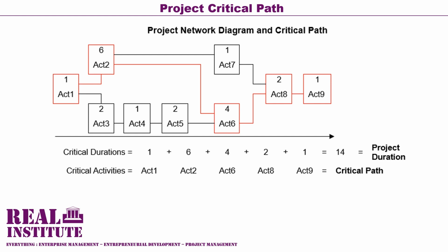The determination of the individual project activities' durations is not adequate to use in determining the total project duration. Due to the complexity brought about to the project work by the sequencing and dependencies among project activities, the durations of project activities are not simply added up together to determine the total project duration. Instead, the durations of parallel or concurrent activities are represented by the longest activity of those parallel or concurrent instances.